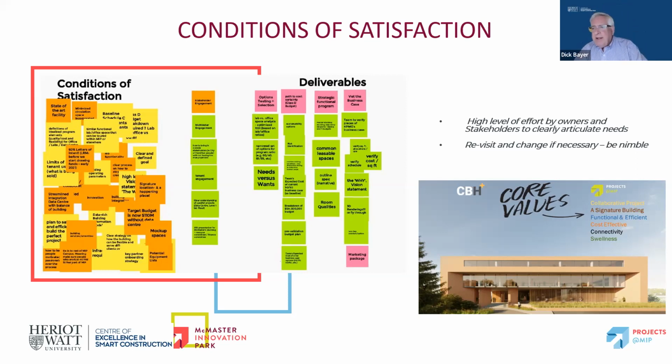I just wanted to add to your high level executive buy-in and how important that was. Because here we had, as you said, the tenant that's going to use the space. You had some financing that needed to be secured for that. You had your partner at McMaster University. So I think we ended up doing 4 different presentations about what IPD is to try to get people comfortable with what their role was going to be and how they had to interact with things, and then how we developed the risk register and the opportunity log. So all those things were really important here.